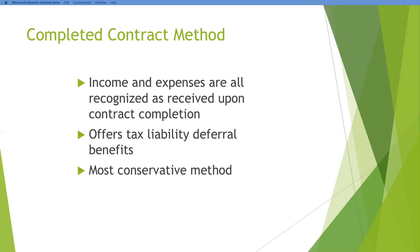In the completed contract method, we are recording our income and expenses as being received when the contract is complete. That doesn't mean you're not sending billings out to the client, and it certainly doesn't mean you're not receiving vendor bills. All along the way, as you're doing that long-term contract, you're going to have to be ordering materials and paying laborers. But you're recording it on the balance sheet in the completed contract method, and at the end you're moving it all.